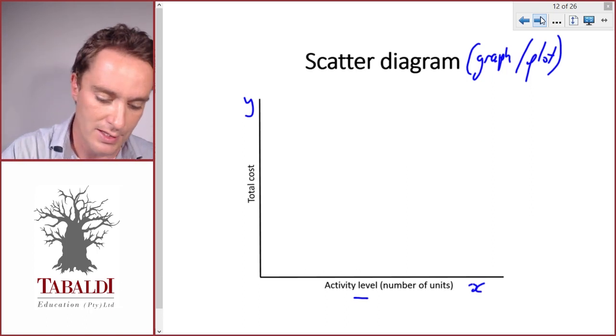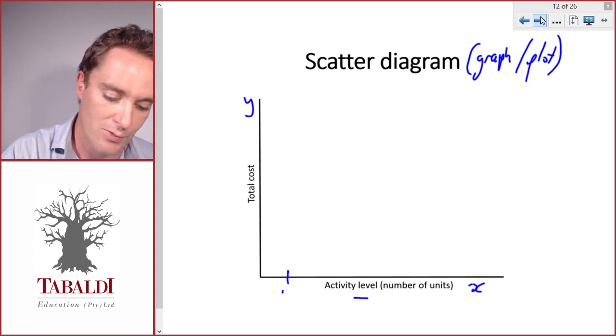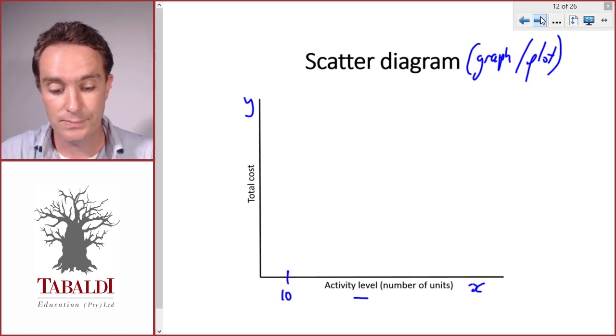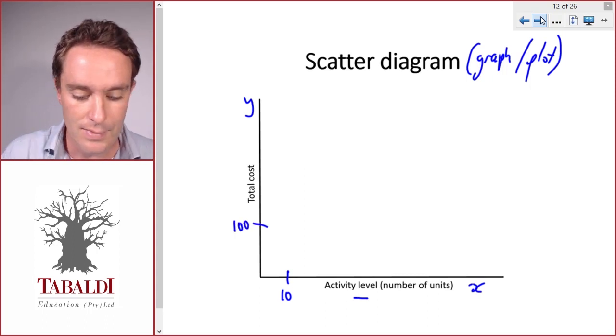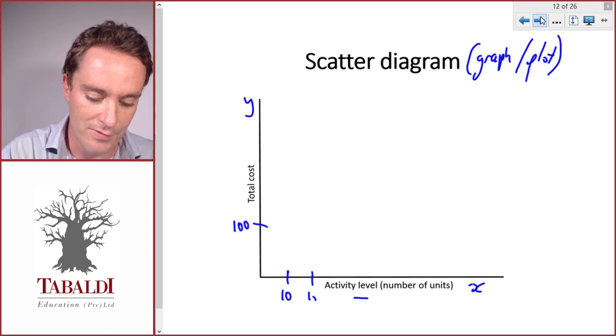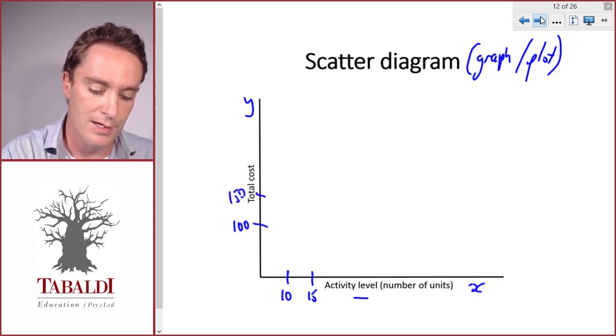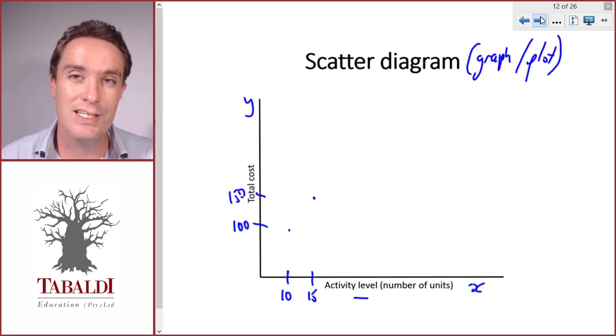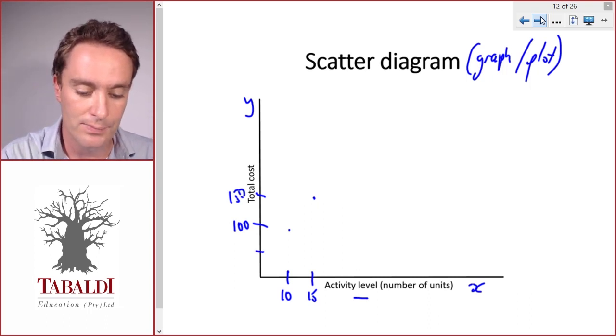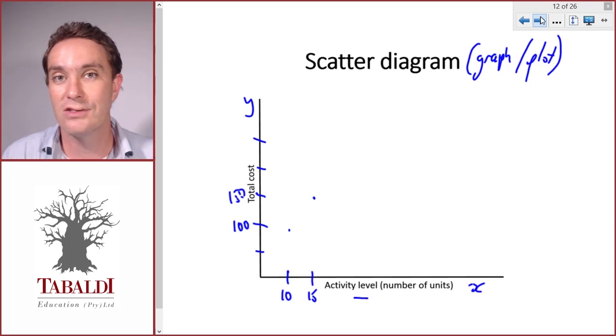So if we plot on this graph, say in the first year we made 10 units and that cost us 100, and then the next year we made 15 units and that cost us 150. We can plot these points on the graph. Now obviously you need to draw this very carefully and on scale, otherwise you won't be able to read meaningful information from it. The more accurate you draw the graph, the more accurate your information will be.